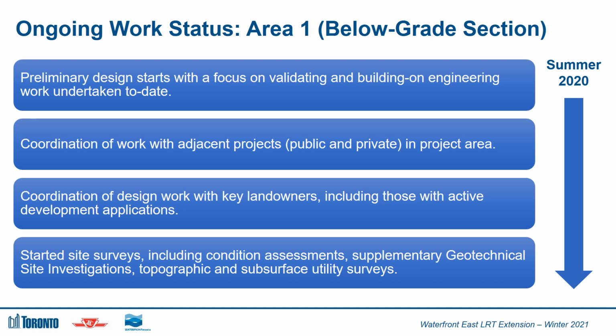On that note, we had also commenced discussions to coordinate and integrate design with active development applications and key landowners. Finally, to support the engineering design, we have also commenced site surveys, which include condition assessments of underground TTC facilities, supplementary geotechnical site investigations, topographic, and subsurface utility surveys.